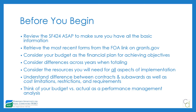Consider differences across years when totaling. Although the SF-424 and the 424A ask for totals — not annual amounts — you want to be as accurate and logical as possible. We recommend breaking your budget down during planning phases and then rolling it back up, on a quarterly or monthly basis if you anticipate a lot of change, and at minimum on an annual basis. That will also help you write a clear, compelling budget narrative that demonstrates reasonableness in cost.